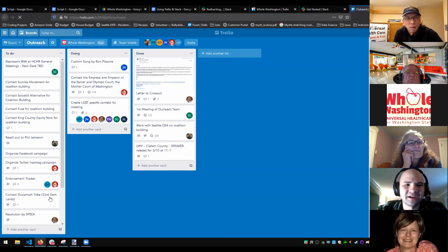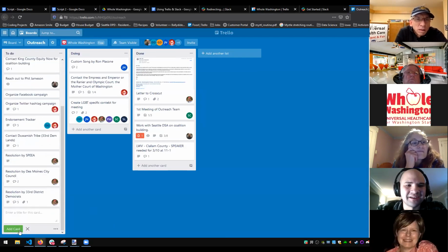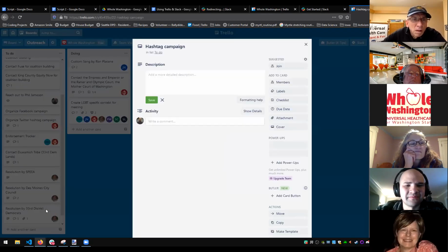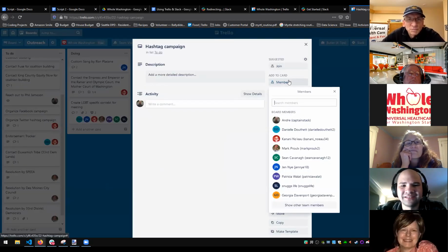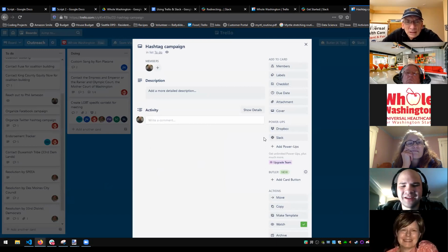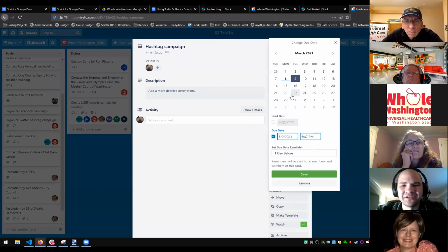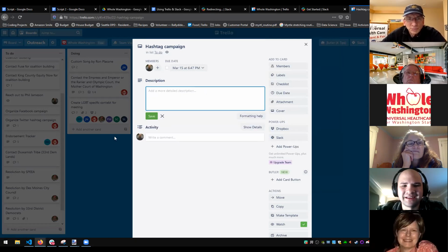It takes me here, and now I would say add another card, and call it hashtag campaign. Now that I'm on Trello, I'll say, okay, I'm taking that. So I've added myself to it, and I'm adding a due date. We're doing this by the 15th.